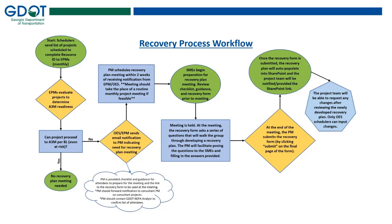Good morning. I'll start by giving a high level overview of what the actual process should look like. The process is going to be triggered by our OES EPMs in coordination with SMEs. It starts with the EPMs deciding at Resource ID Complete whether a project is ready to advance to A3M. If that project can go to A3M — even if it is at risk — that project will not fall in the category needing this overall process. Right now it's only for projects that cannot proceed to A3M.